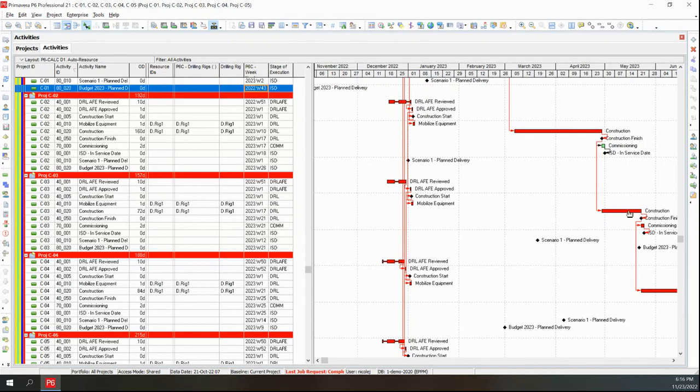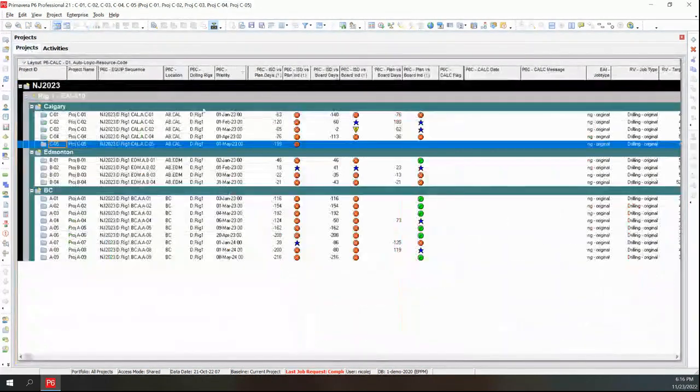Now, if I change the order of the wells that I'm going to drill, I would probably have to start breaking logic and changing the logic, etc. So one of the things that we built for this kind of client is the ability to tag that a project is supposed to have a certain priority. In this case, I've got projects 1 to 5, and I've got a priority. In this example, I'm using a date, kind of a target date, as the priority.